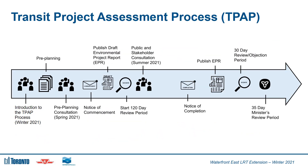We are currently in what is referred to as the pre-planning phase of the TPAP process. This is where the study team collects background information, completes environmental investigation, identifies the proposed project through design work, and evaluates alternatives for components that have alternatives in preparation for the environmental project report. This pre-planning work will be completed in late spring 2021, which will be presented at the next public consultation and will be followed by the issuing of the notice of commencement and publishing of the draft environmental project report.